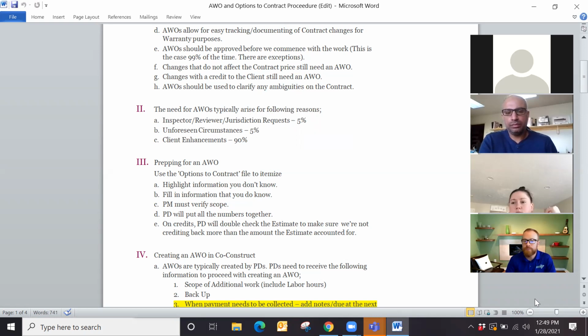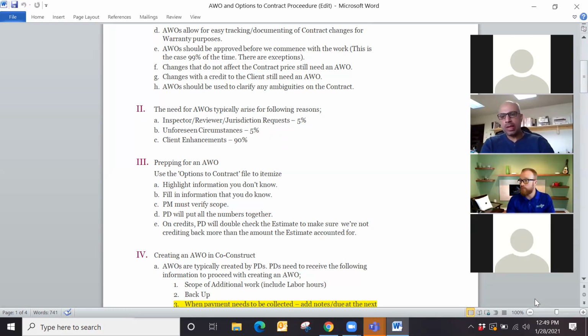Well, I mean, I can point back to the fact that they recognized that this could possibly happen. Yeah, without a doubt. If there's that clause in the contract, just like you're describing, and then there are initials at the bottom of that page, which is essentially how all home purchases would take place, you're responsible for everything you just initialed on that page. Yeah, totally agree. And we can make some adjustments to make sure that we feel more confident in that.